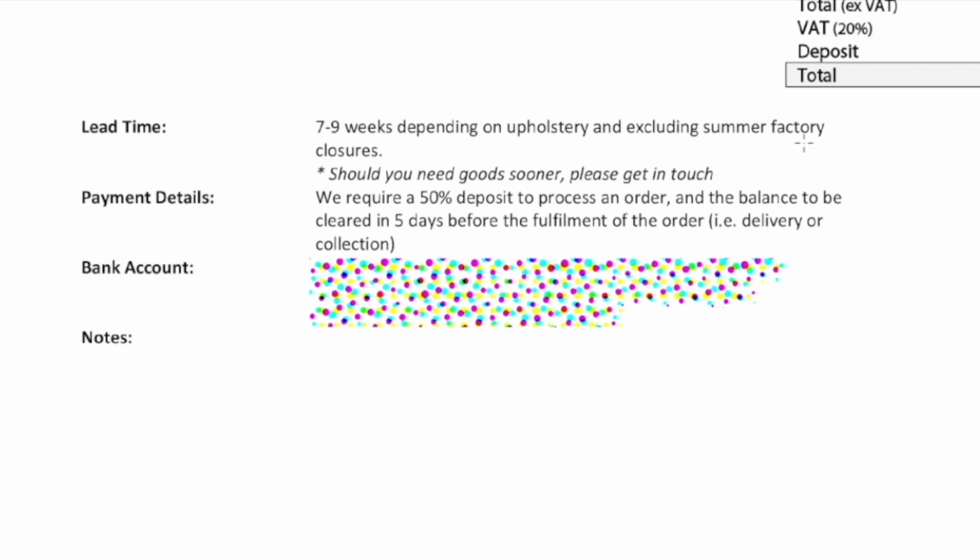But in Europe, they close their factories for, I think, either a month or 2 weeks at some point in August. So basically all the production stops. So you need to be aware that if you are placing orders during that time or just before, that is going to affect your lead time.